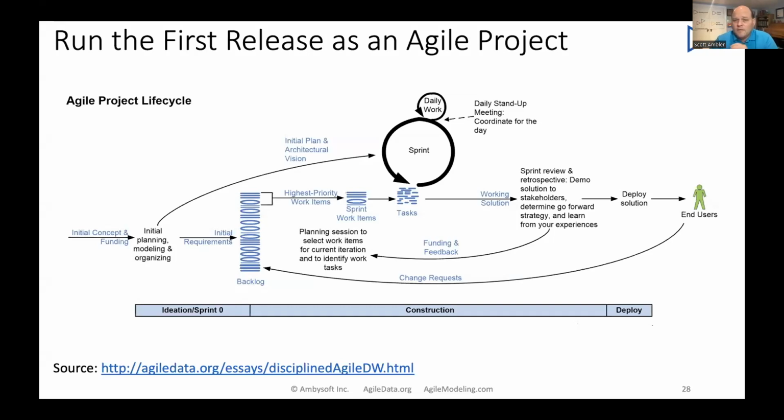So a little chunk of work that's 2 or 3 hours should only take 2 or 3 hours, right? Yes, there's a difference between work time and calendar time, but the issue is that these regular sprints, which are a good idea in many situations, force you into this small batch mode. And because you get forced into a small batch mode, it can elongate your calendar sometimes.